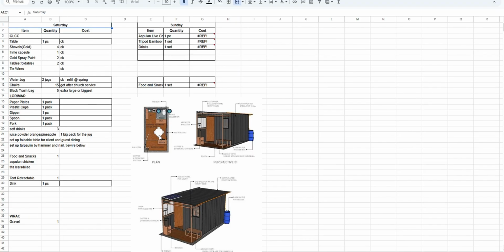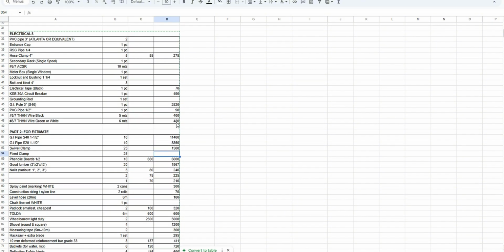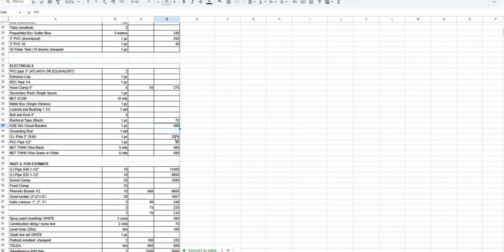That's why you always base it on the design. This design, what materials go into it and how will it be done and what equipment is needed. Then you go towards the hardware and then canvass the price. Of course, you cannot just keep canvassing without buying. That's why you have online research and previous experience.